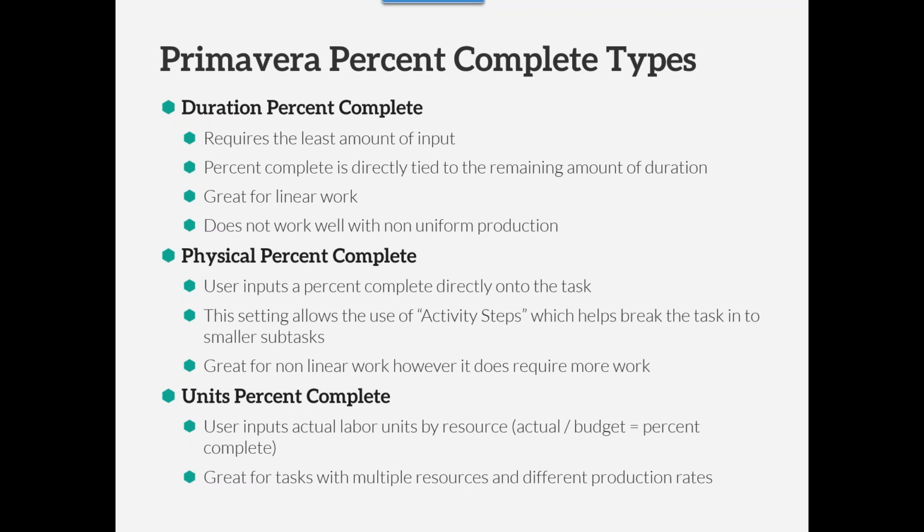The other thing the physical percent complete uses, and where I think Primavera has tried to solve this problem, is through activity steps. The problem with activity steps, and why I think most people end up coming out of the system, is all the other questions that happen on a project, like how many linear footage of pipe did we install in a particular area?